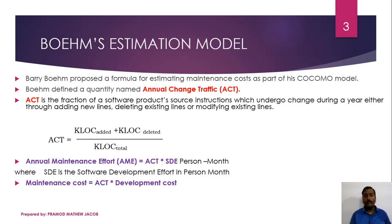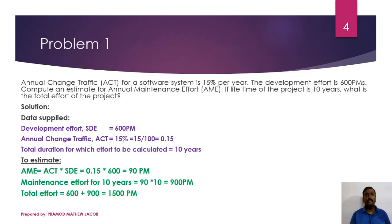Annual Maintenance Effort (ME) is equal to ACT multiplied by SDE, in person months, where SDE means the software development effort in person months. Maintenance cost is equal to ACT multiplied by the development cost of the software product.